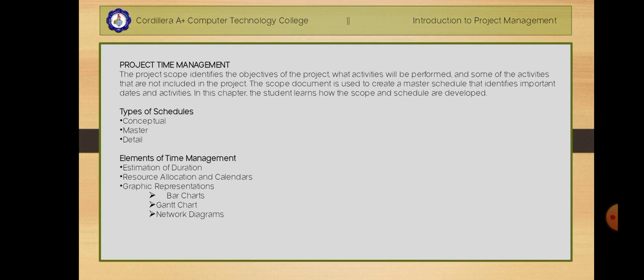If major pieces of equipment are only available for a certain period of time, they can be given a resource calendar. That resource calendar becomes an important tool when schedules need to be changed. When a resource calendar is applied to the duration estimate, the duration in days is distributed across the available calendar days.